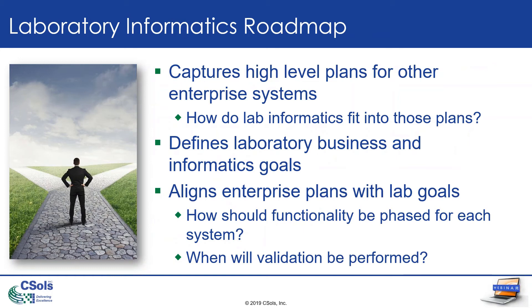Once we have our steering committee, we'd like to have a lab informatics roadmap. Sometimes we create these as part of vendor selection engagements; sometimes a client already has one. This is parallel to a general informatics or IT roadmap — it captures the high-level plans not only for the lab but for enterprise systems and how lab informatics fit into those plans. For example, if you have SAP QM and use it to capture final result data and generate a certificate of analysis, you might want LIMS to replace that system or work in conjunction with it.